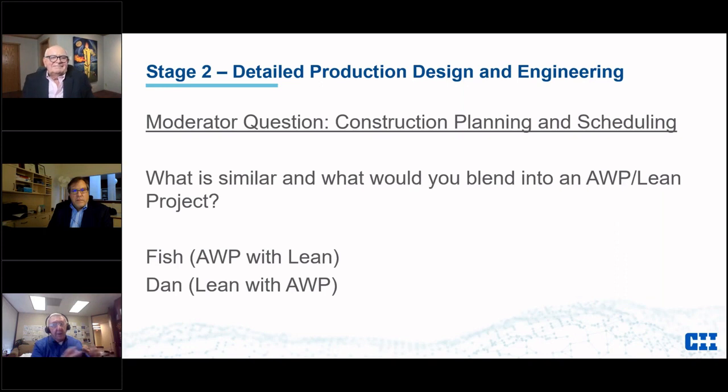So we go in and we're messing with a fab shop, but it's a necessary messing with a fab shop. So my inspectors and expediters go in there, work with the fab shop, and start rejuggling those priorities again and make sure they get right. So production planning in pipe fabrication and steel fabrication is very, very critical.